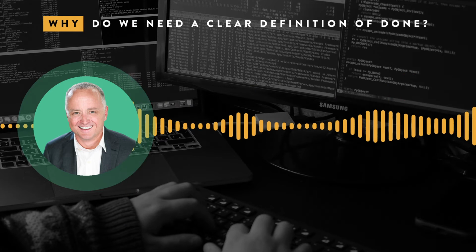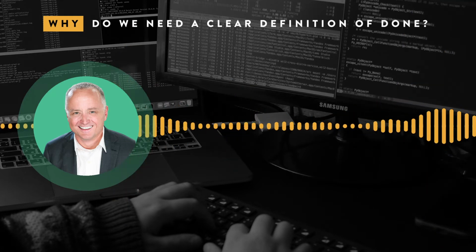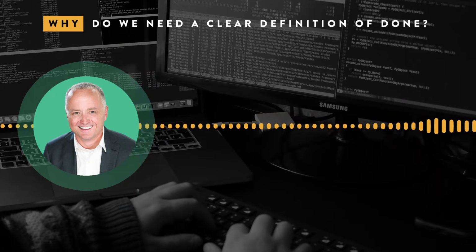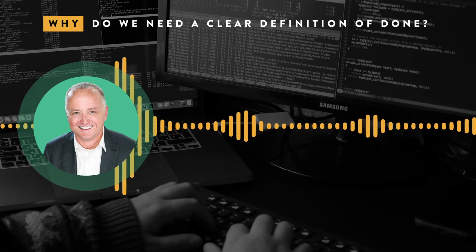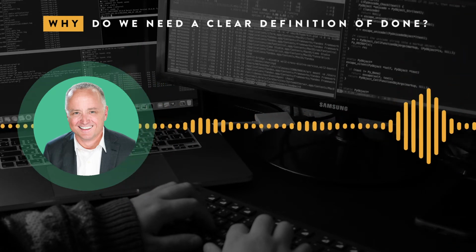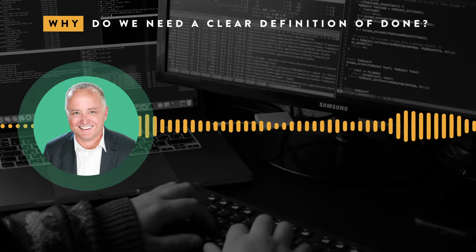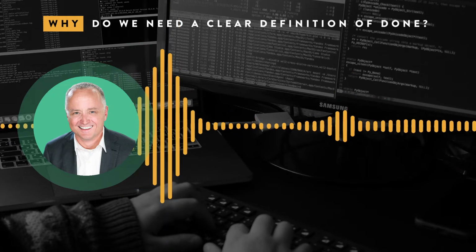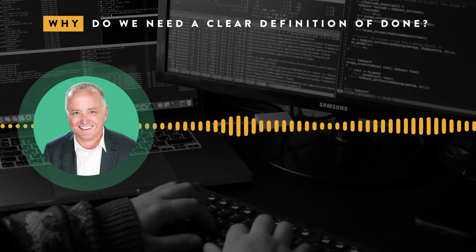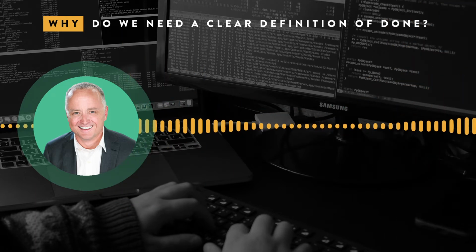But then we actually experience this in the early days too. The backlog isn't 1,000 points. For every 200 points we deliver, we're putting another 150 back in the queue. So for all practical purposes, our velocity is 50 or something like that, and the apparent rate is a lot slower. So you just have to be very real about this kind of stuff.